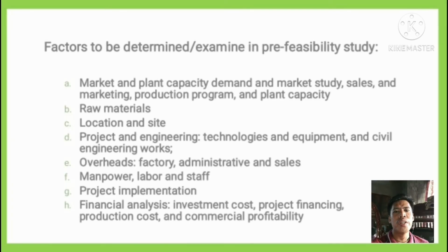There are factors to be determined or examined in a pre-feasibility study. These are the market and plant capacity, demand and market study, sales and marketing, production program and plant capacity, raw materials, location and site, project and engineering technologies and equipment, and civil engineering works. Overheads that comprise factory, administrative, and sales. Manpower, labor, and staff. Project implementation, financial analysis, investment, project financing, production cost, and commercial profitability.